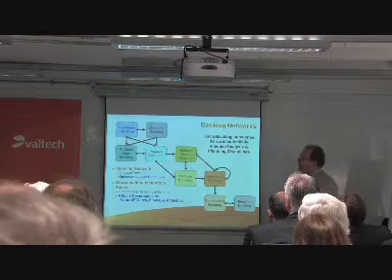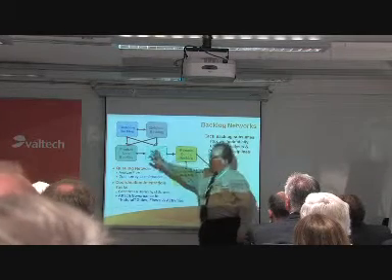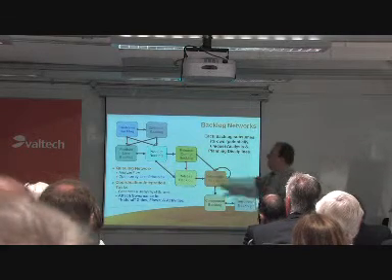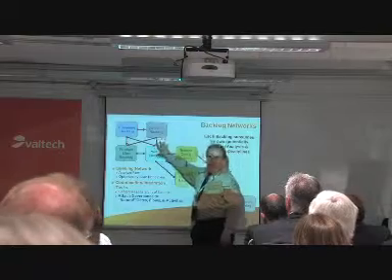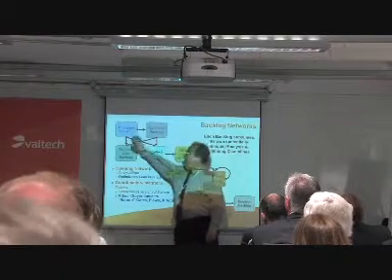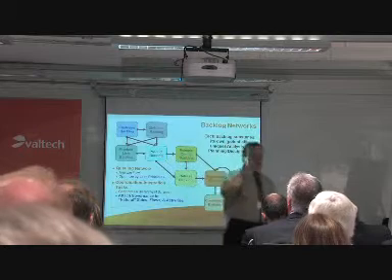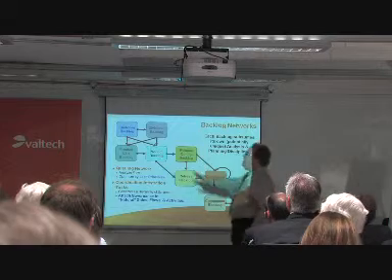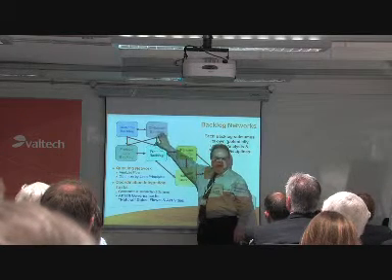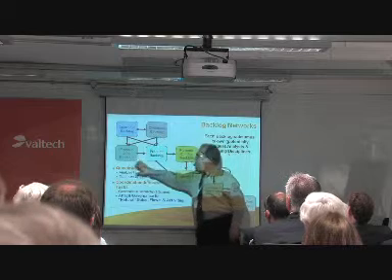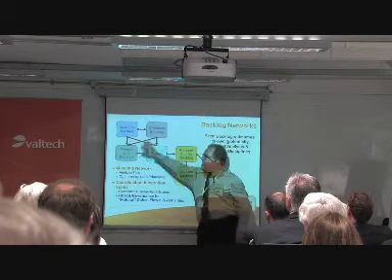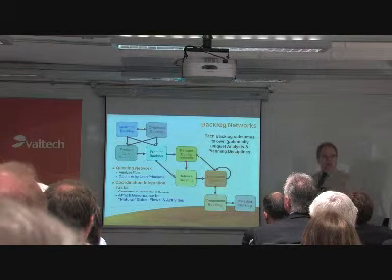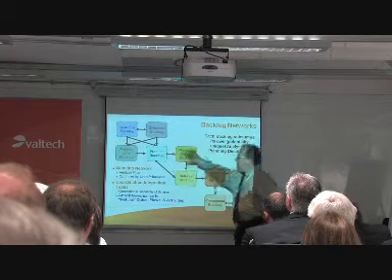It takes those 3 fundamental different kinds and makes for product backlogs, which contain goal stories and feature stories. For them, they require 4 different kinds of product backlogs in a specific flow relationship. They have customer-facing backlogs, where each of their major customers has a specific set of features and goals that they need in order to support their business, as well as divisional strategic planning backlogs at the goal feature level. Those then flow into product line backlogs and individual product backlogs, and there's a complex flow relationship, but a specific flow relationship among those strategic planning backlogs, which then flow down into release backlogs.